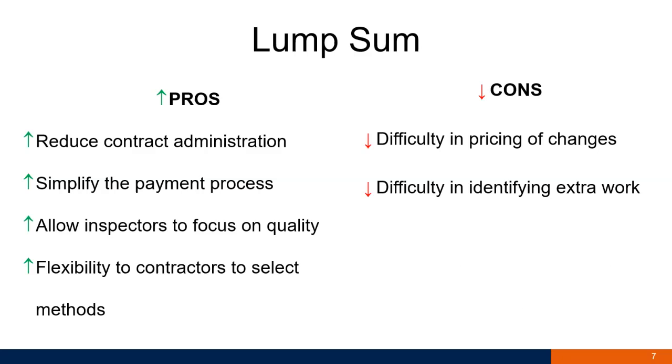Same thing, it also has difficulties in identifying extra work. And also contractors tend to put more contingencies, or more money, in their proposal, since they think this is more of a black box, or a riskier way of pricing a contract.